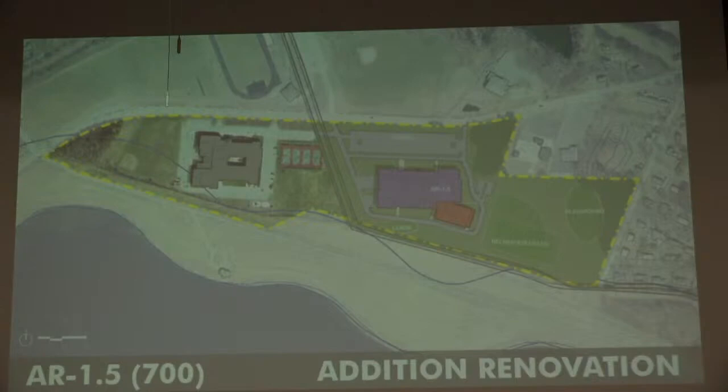We're always trying to think about how the contractor is going to stage this site, how they are going to access the site, and what that means for the overall disruption to your staff and students. By putting it on the back here, it allows the contractor to have a nice lay-down area in the back, and really keeps that construction in that early phase separate from the rest of the building. So in this particular option, we're not taking out that front northwest corner as you saw in all the previous options. The major construction to build our swing space is all relegated back to this rear area. So early on, that's where all the action will happen.